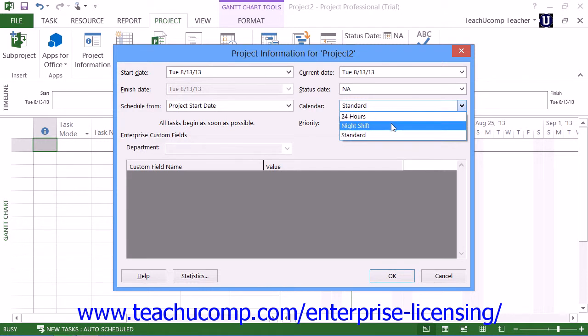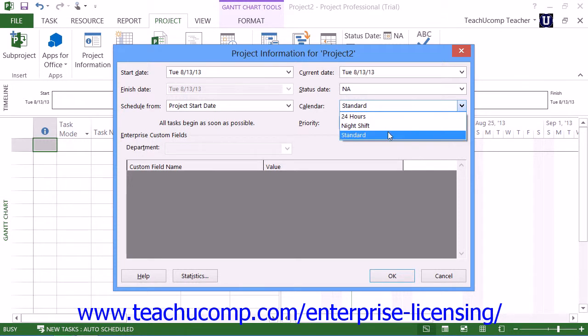Night Shift to allow for the scheduling of project-related tasks from 11 p.m. to 8 a.m. Monday through Saturday with a one-hour break each day, or select Standard to select the scheduling of project-related tasks from 8 a.m. to 5 p.m. Monday through Friday with a one-hour lunch break each day.